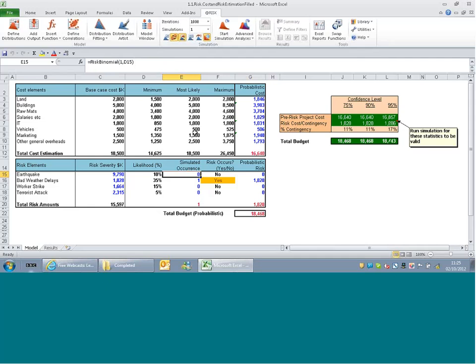But you need to be very careful with correlation because it is very much a two-way thing. And so you could be in a situation where your cost of raw materials is lower than expected, just because there's bad weather delays or an earthquake. So probably I'd be inclined to go for an if statement and just to have two different forms of the same distribution. One if an earthquake happens, one if an earthquake doesn't happen. That would be my suggestion.